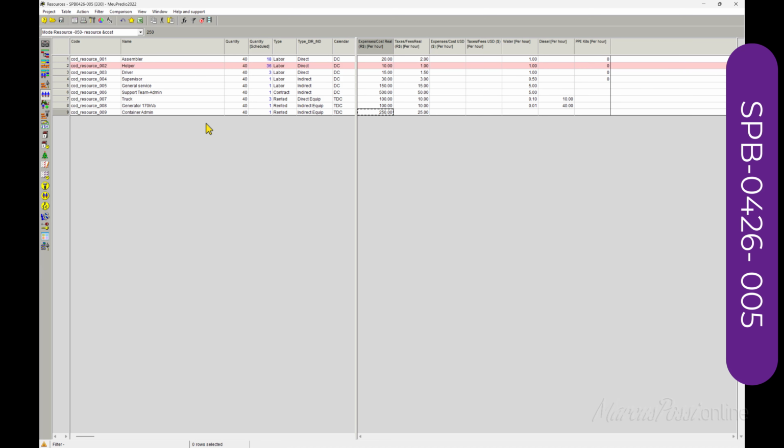You should consider registering by hour or by month, which would make a difference in the project's final costs. You have to think about that: creating a value by hour, or creating values by month, as is common in commercial renting periods.